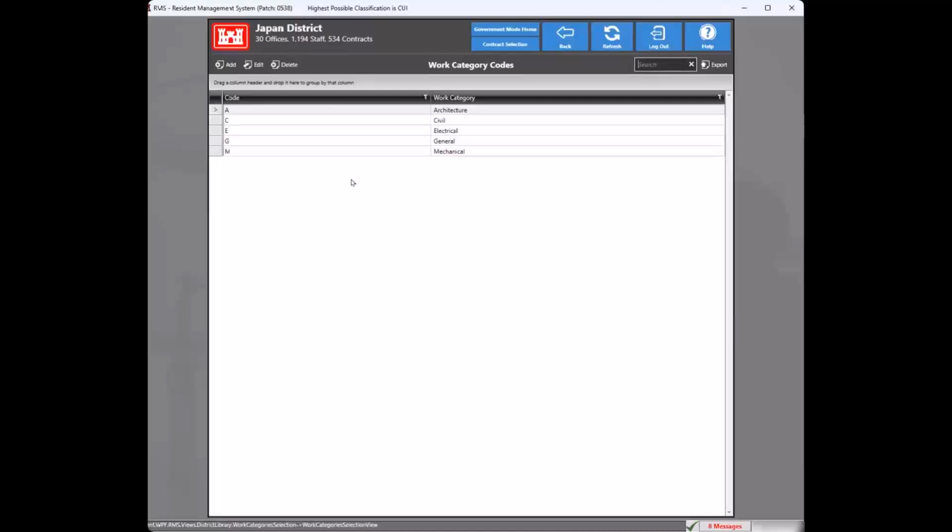So this is why you'll sometimes see the invalid codes, because sometimes they'll work in a different district that has different category codes. Could I just interject one more thing? Generally, our spec says your category codes are mandatory and have to match the spec. So really what I'm doing is making sure that our district codes match the spec, right? Essentially, yes. Okay.